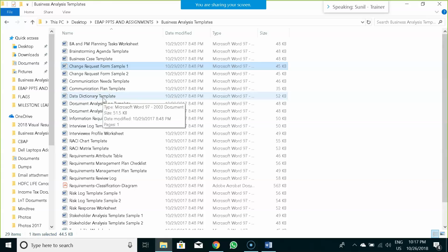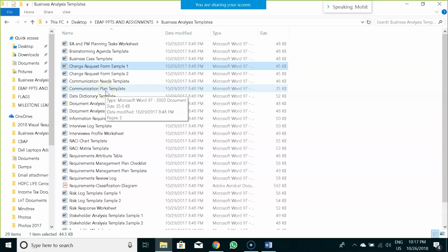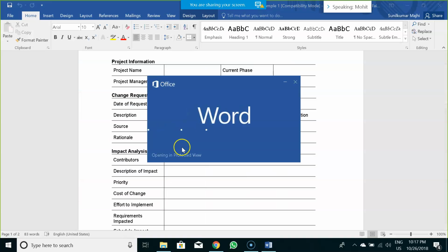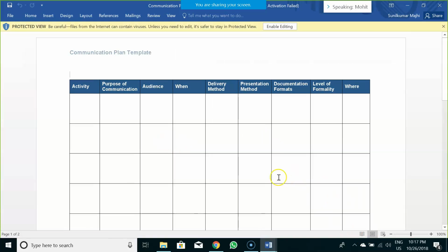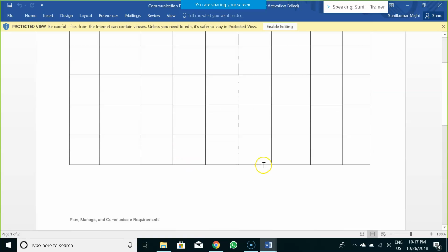Now, Sunil, the communication template, do we edit the existing name? For example, an X person was there, the stakeholder was a product owner initially. Now we have a Y person who is the product owner. Yes, you are allowed to edit it. Okay, so we can change X name to Y? No, you won't edit it that way. You would strike out the old stakeholder and you would add the new stakeholder, because you have to have a record of who has given the prior requirements. So you cannot completely delete it. You have to strike it out. Okay.